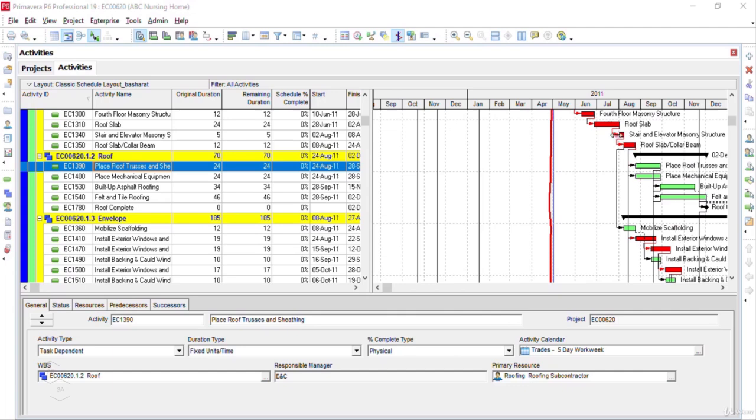Now, we have small arrows between the different activities. These arrows are basically showing the relationship between these activities, whether it is a finish to start, finish to finish, start to finish, etc. We'll have more details about the WBS elements, activities, and the relationships in our coming lecture.